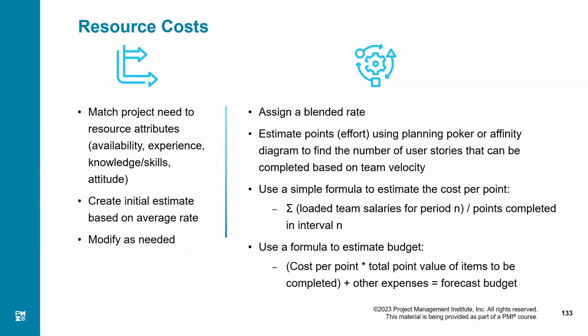So one user story may have a story point value of 200 story points. Another story could have just 5 story points. The story which has just 5 story points, that means that is simpler, easier, and not complex. It is not taking a lot of time, it is not taking a lot of money. But the story which has the story points of 200, that is more complex, that may take more time. I don't need to know how much time it will take.